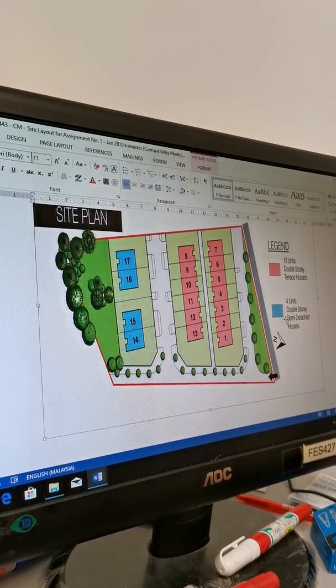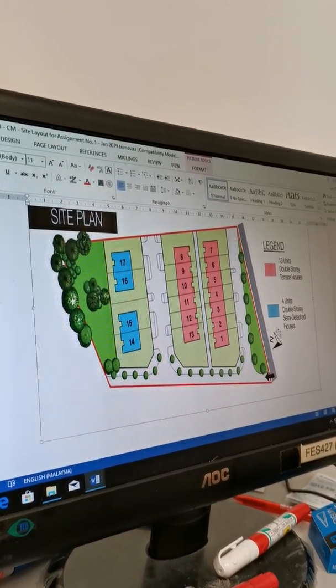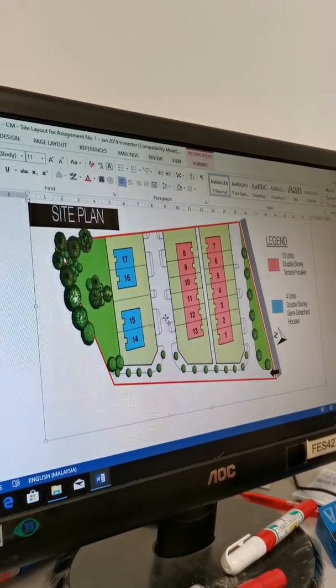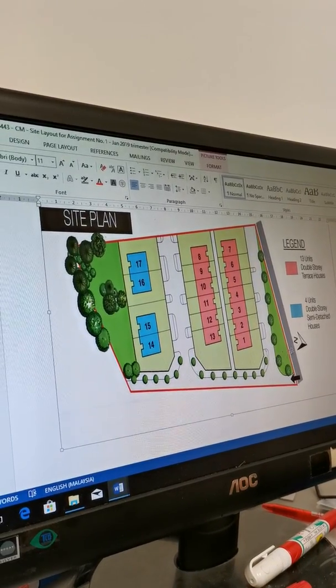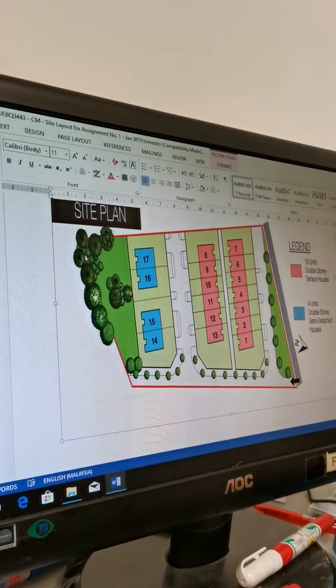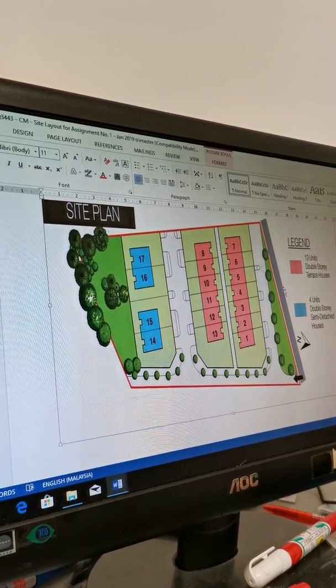So then later on, if your project like this one is 17, then you times 17 for your human requirement. I call it the labor requirement, the people requirement, and then the machine better follow the block basis. Okay, and then you can size up already what are the things to put on all this empty space here. And then the access, the safety things.